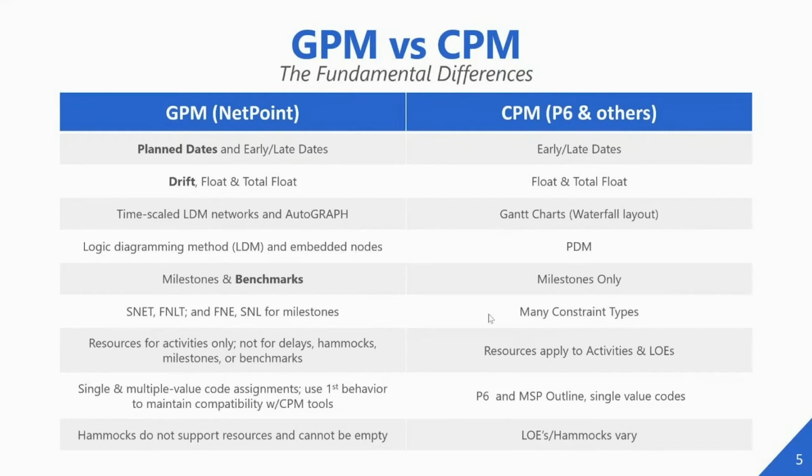If you have activities on planned dates in NetPoint, when you transfer that information into P6, it gets lost, as P6, as soon as you schedule the project, shifts the dates to their early dates. So one thing you would probably want to do when you transfer a schedule which has planned dates is constrain your activities to those dates before you export the schedule out to P6.